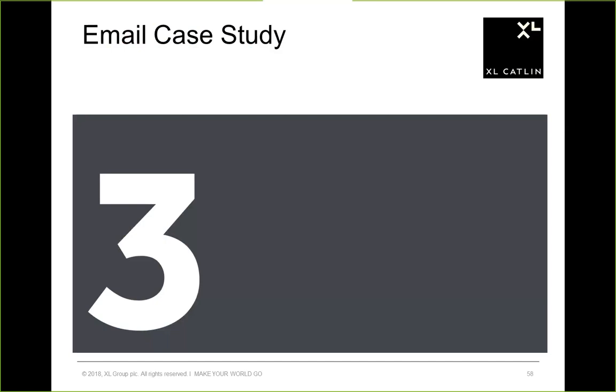And that becomes our written confirmation of what was discussed and decided, whether it's with a client, teammate, another firm, or a subconsultant. And that's how we lock that in. Otherwise, it just becomes verbal, and then it's their word against ours, whether we got that direction change or other matters.